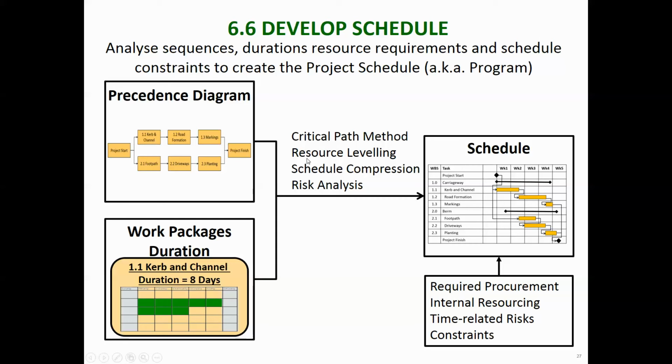Then you put it all together into the schedule, and then you optimize it. So you level resources that might have been over allocated, and you try to compress the schedule. So you try to reduce the time. And you're also doing risk analysis.